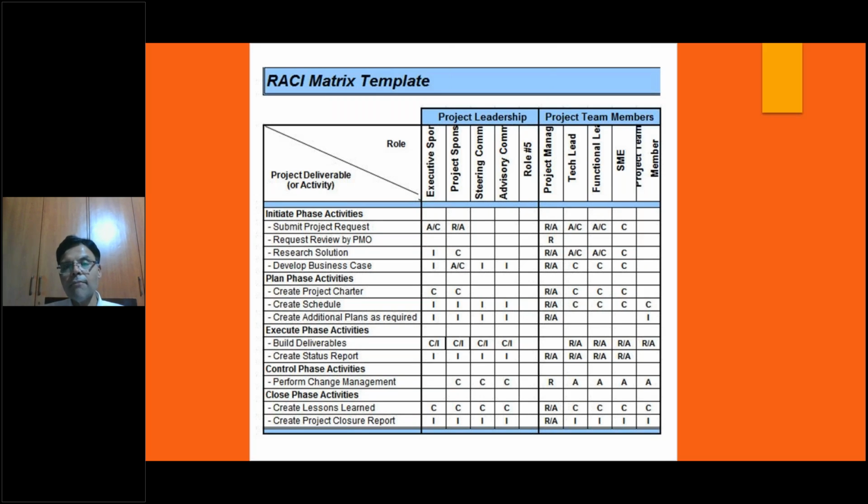Now, at this point in time, when you're trying to define roles and responsibilities for the people in a project, you might not be in that project. We never had the names to those roles. I'll repeat, we never had the names to the roles. And that's the first so-called process, even in the PMBOK, the Project Management Body of Knowledge, called the Plan Resource Management process.